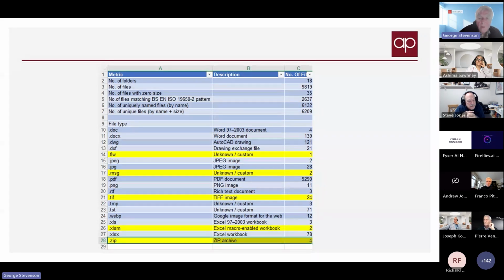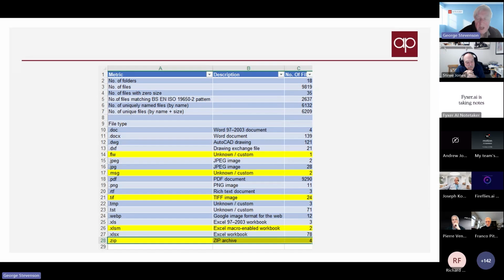So what we're doing here, we'll be showing how we can do this. We can take a zip file and it will analyze what's in the zip file and then very quickly tell you what the format is, and probably identify where there are incomplete files. So that can be done in 10 or 15 minutes rather than spending several days doing it.